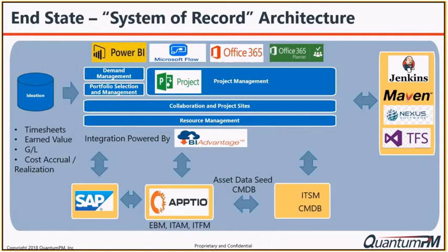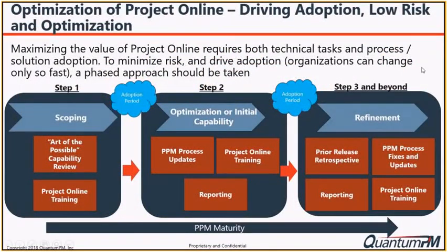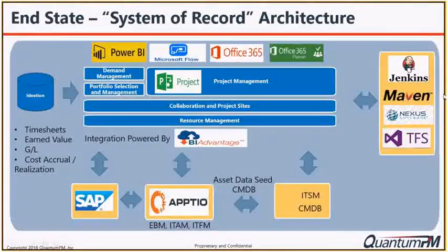And then we talked about this whole idea earlier of phasing this thing. This is a classic example of something where agile development, with an infinite number of phases and the ability to adopt work, works really well. You might just want to bring in ITSM, low complexity integration, for the first sprint. And then after two or three sprints, you might say, well, I'm going to add a little more complexity to it. Instead of just bringing the sprint start and end date and the status, I might decide subsequently, oh, by the way, I also want to bring the content of the sprint. What are the stories that are included in it, if you wanted to make that choice? So you have that capability to do that.